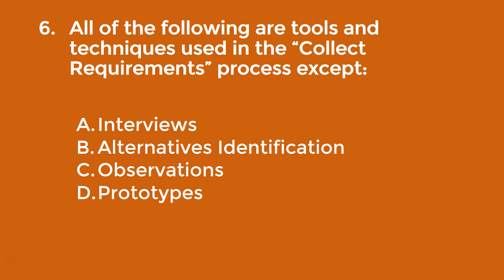Question six: all of the following are tools and techniques used in the collect requirements process, except what? The correct answer is alternatives identification. That's used in the define scope process, which occurs after requirements are collected.